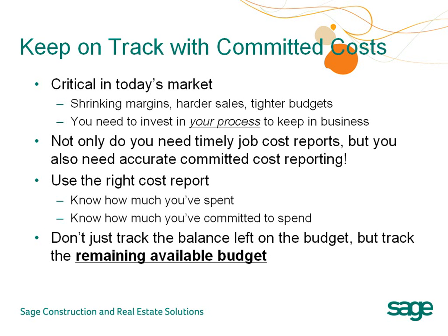Lots of software packages say that they do job costing, but a true test of a software product that really understands job costing is to look at the committed cost report. Can you see at a glance not only how much you've spent so far, but also how much you've committed to spend? That's the kind of information you need to know if you're going to be off budget before it happens, when there's still time to do something about it and make corrections.